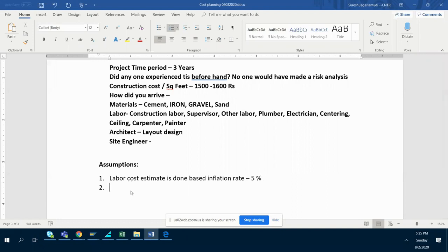And also cement and material cost. By the way, in all government projects, material cost escalation, you call it the escalation. What does escalation mean? It is a rise in price, or price fluctuation. Even in government terms, if the fluctuation is more than 10%, the government should bear that cost. You know that there is a clause. Even if labor price goes up beyond 5%,